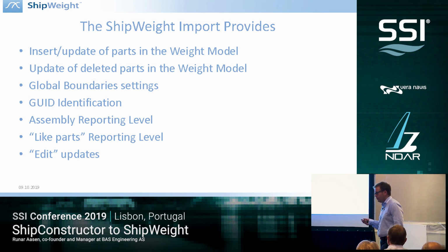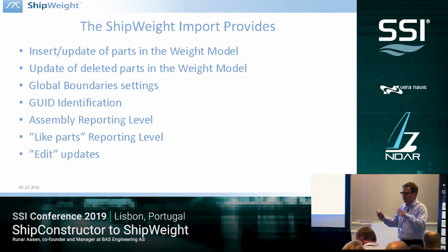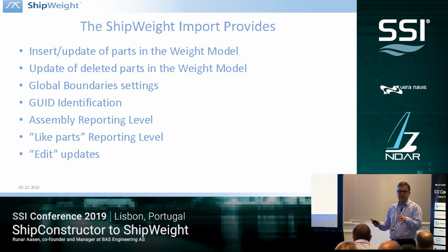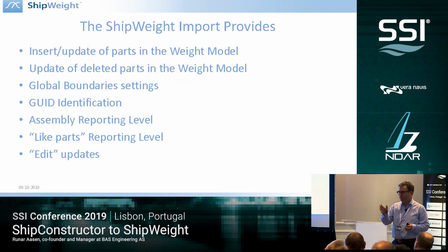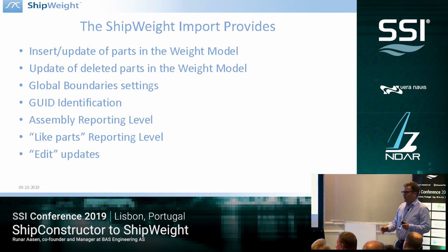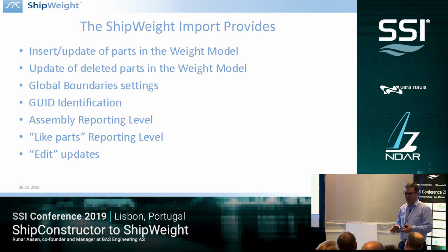And finally, the updates are handled in a smart way, which means that in the weight model, in Shipweight, if there are parts coming in without a SWBS, and the weight engineer goes ahead and assigns SWBS numbers, work breakdown numbers, to the parts, it's of course very important that the next time the update happens, that work is not lost.